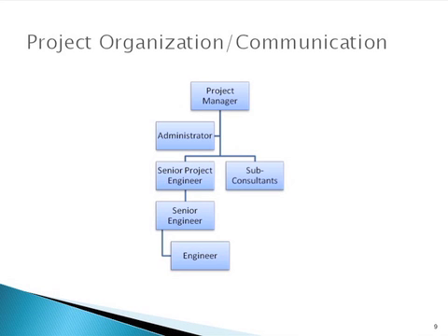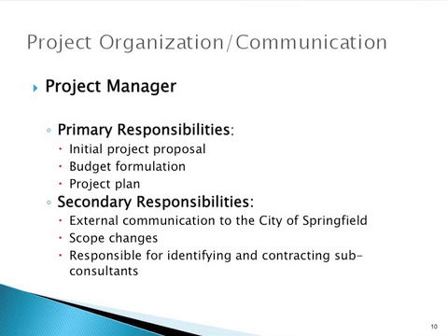As you can see from the diagram, all of our projects utilize a project manager, administrator, senior project engineer, senior engineer, engineer, and subconsultants when necessary. Now, the project manager's main responsibilities are the development of the project proposal, budget formulation, and project plan. Also, he's responsible for any sort of external communications to the client. When subconsultants are needed, he then goes out and identifies and then does the contracting with those subconsultants.